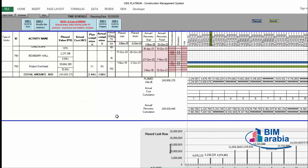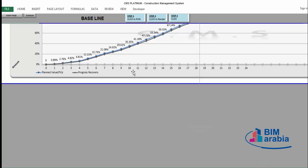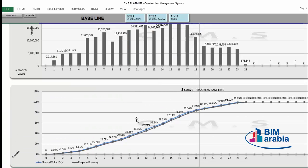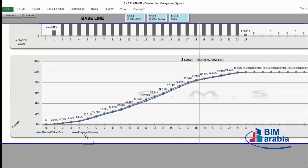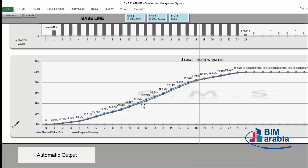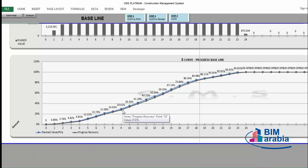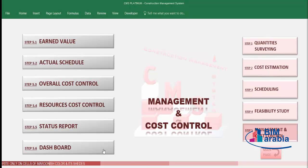That's why your actual completion is 1.66% instead of 2.44% in the second month. We'll see all this in the report when we reach it. You can see it clearly in the graph — the progress baseline and progress recovery chart: the blue line is the planned value and the gray one is the progress recovery. Now there is some delay due to what happened in the raft and BCC. This will be clear in the dashboard. CMS now has the planned value and earned value; the remaining balance is the actual cost.